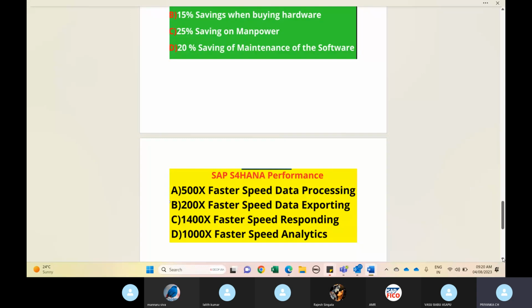Rather, in ECC and ASAP, it will take months to see what exactly is happening on the configuration side, because every stage will take 3 months, 3 months, 3 months, and the whole project takes about 12 to maybe 18 months. Until they come to the realization stage, the business user has no idea what exactly is happening in the software, what configurations, how it is going to look.